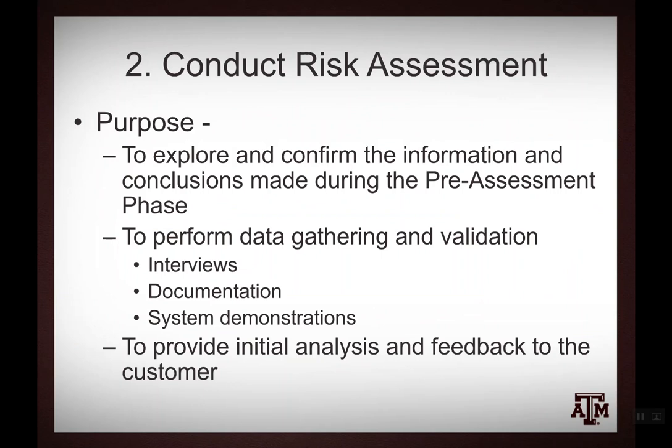Okay, now when I talk about documentation here, I'm talking about system documentation. They're going to hand you policy, procedure, manuals, and the like. Again, you create what I call a source log. And I keep an Excel spreadsheet usually of every document someone hands me, who handed it to me, when I received it, and the identifying information on that document. Why? Because I want to be able to go back and trace my conclusions. I want to be able to say, I was told this in an interview, or I saw this in a document, and here's the revision I was given, and here's who gave it to me. Okay? Same thing with system demonstrations. When you get a system demonstration, take notes. Who's there? Who gave the demonstration? What did you ask? And the like. It's a lot of paperwork. You're going to want to keep it in electronic files, but you will develop a better risk assessment.